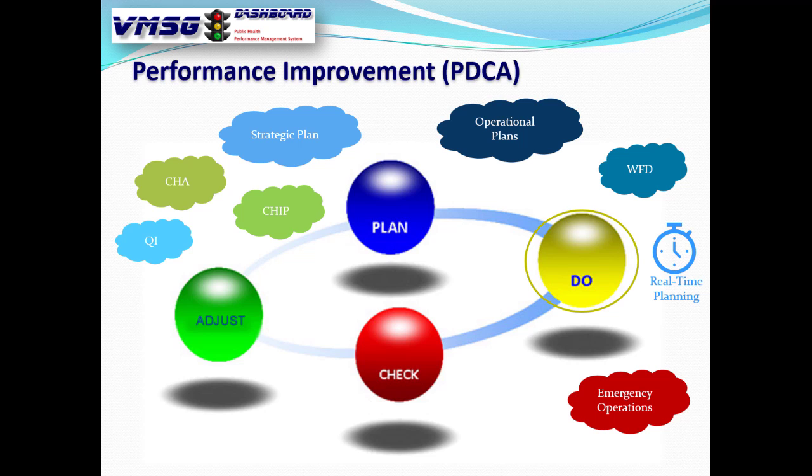What we're going to do in the background is set up this thing called RealTime Planning. RealTime Planning is a combination of an automated email notification system. Remember those email flags we checked at the activity level here? Those emails will go out to the person who's responsible for updating the objectives and activities. That person is going to respond to that email through what we call the quick update system, which allows them to very simply go in and update the activities that they've been assigned and keep that information up to date.